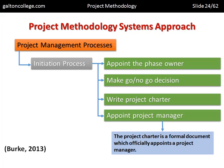Then, appoint a project manager — this is not necessarily the phase owner, who may be a senior member of management. The project charter is a formal document which officially appoints a project manager, who will be responsible for the delivery of the project. The project manager will not be starting from scratch — they will know what the project is, what the resources are, and who has overall authority. But the day-to-day routine must be set out, and when problems arise, it falls to the project manager to deal with those issues.